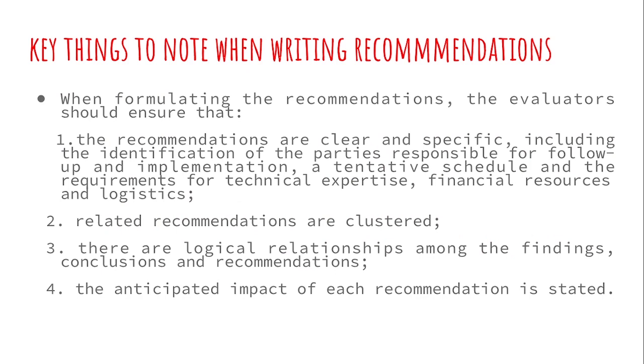So key things to note when you're writing your recommendations. When you're formulating your recommendations, you as an evaluator should ensure that, one, they are clear and specific, including the identification of parties responsible for the follow-up, who will follow up these recommendations and implementation. And you should also include a tentative schedule for the implementation of the recommendations, the requirements for the technical expertise and the financial resources and logistics for these recommendations you put in your report.